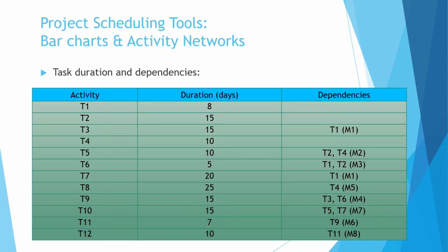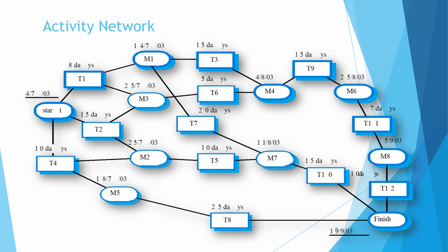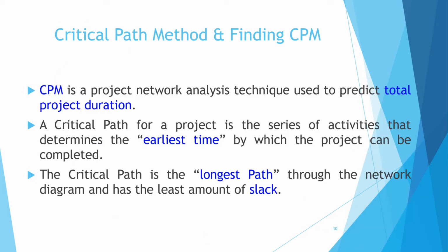For example, T5 can start only after T2 and T4. So T5, which we mentioned, can start only after T2 and T4, and so on, from start to finish.